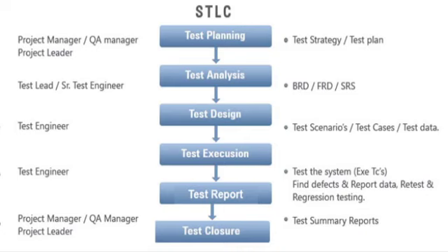After level 1, the developers will fix the bugs, and then level 2 will start, which is retesting and regression testing. In level 2, testers will do retesting and regression testing. Here, retesting is nothing but testing the application again to know whether the bugs that were raised previously are fixed or not. If the bugs are not fixed, they will reopen the bugs, otherwise they will close those bugs and do regression testing.